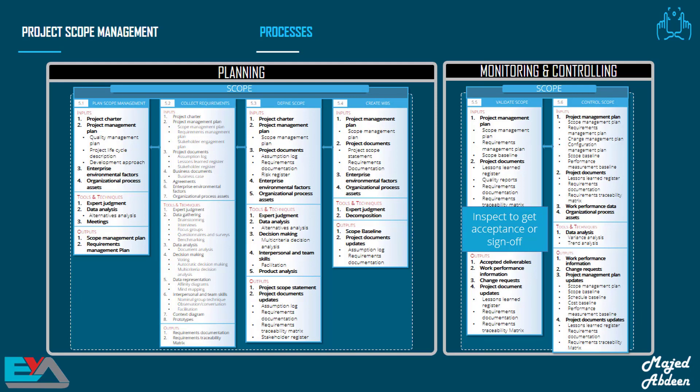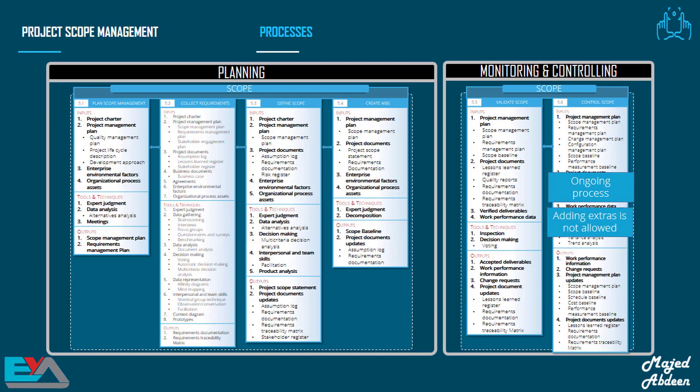During the Validate Scope process, you have to inspect the completed deliverables in order to get formal acceptance from your customer, the project sponsor, or any authorized stakeholder. You will get at least one or two questions in the PMP exam on this. By the way, we call this the sign-off process. The last process in this knowledge area is Control Scope. We always have to control the scope during the project — gold plating, which means adding extras, is not allowed. Scope Creep is the term we use to describe uncontrolled changes that make the team do extra work. You will get some questions in the exam on this too.